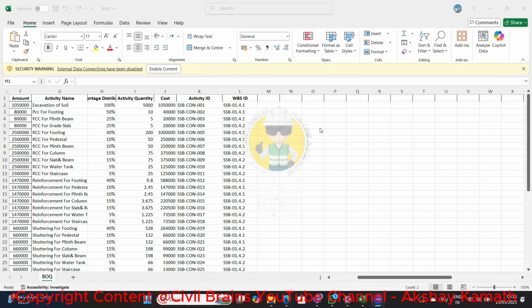Give me a moment, let me open the productivity calculator. Now you can see, first, you have to write all the crews which are going to be used in the project in the x-axis, and put the productivity accordingly, so that we can use Power Query to calculate the durations in the easiest manner.